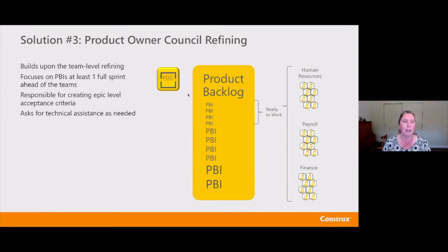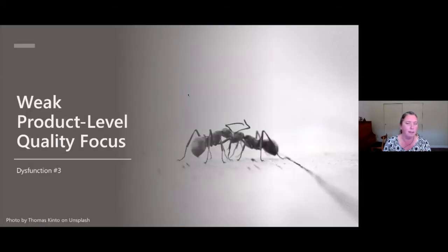So our second dysfunction is having too many cooks in the kitchen, having too many people responsible for prioritization, decision making. We really want to make sure that there's an effective, useful approach with clear ownership for who is going to make those decisions in place. And the Product Owner Council typically meets 1 to 2 times a week. So I'd forgotten to mention how frequently they typically meet.